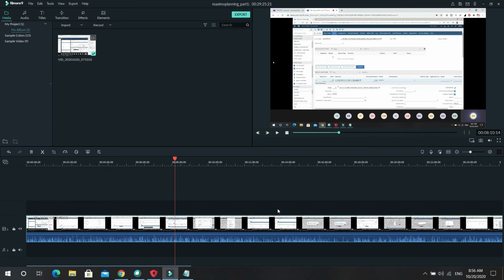But your plan looks fine. You've got a start-to-start relationship in here, so 10 and 1 are going to start at the same time. And because this is a contractor, there wouldn't be any rate showing here. So this looks fine. You've got your task numbers in front of your crafts, so it looks good. Okay, who's next?